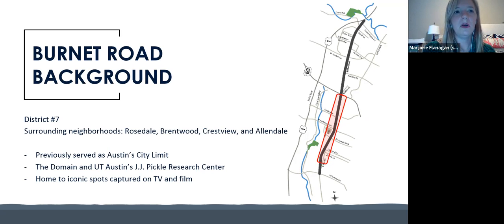I did want to note about our timelines. All of these contracts are above our department's authority to move forward with before we receive council authority. So after the artist is selected, that selection is approved by the Art and Public Places Panel and the Arts Commission. Then we take that recommendation to City Council for their approval to negotiate the contract. So there will be a bit of a lag time between when the artist is selected and when they go under contract. I would say 3 months.